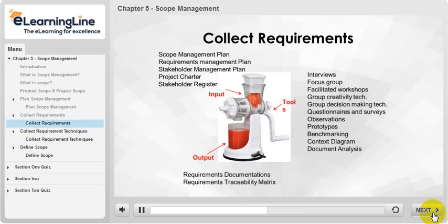Yes, we will gather all the requirements of various types, generally consisting of business requirements, stakeholder requirements, solution requirements, project requirements, transition requirements, assumptions, dependencies, and constraints. These requirements are noted as a part of requirement documentation and traced according to the needs as a part of the requirements traceability matrix, like business needs, project objectives, project scope, WBS deliverables, product design, product development, test strategy, and test scenarios. High-level requirements to more detailed requirements.